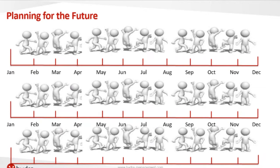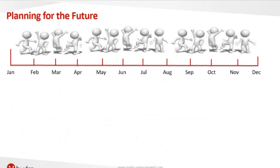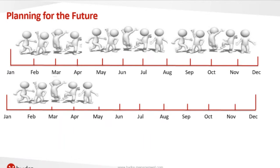Okay, every single project. I might have 50 projects, I might have 1,000 projects, and I might only have 10 resources, or I have 150 resources. And it's going to take me 3 years. But suddenly you want to ask the question, well, what if I want to deliver this in 2 years? What if management said, can't have that, I need it delivered in a year or 2 years? So what you're able to do is put in what we call not after dates and say, well, what if I delivered this from here?